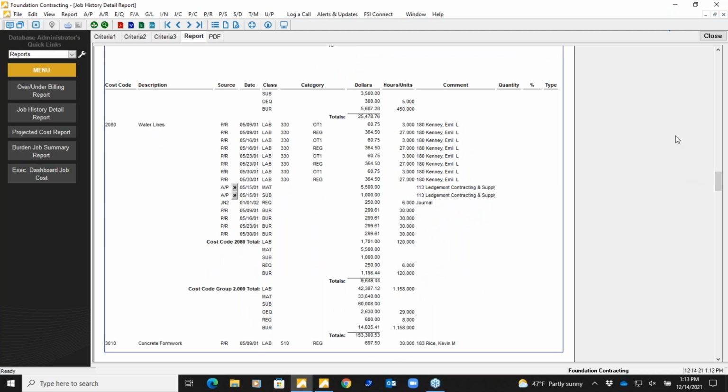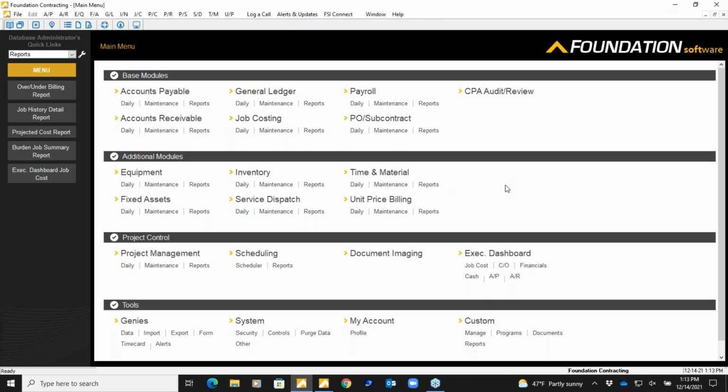So I also wanted to touch on not only just actual true audit, actual true cost reports, but we do talk to clients that like to do projections or cost projections. So another important report is going to be a projected cost report. So now we were able to examine estimated cost. We're able to see actual cost. We're able to see committed cost. But what about that fourth line item of cost or fourth value, so to speak? And that could be what we project.